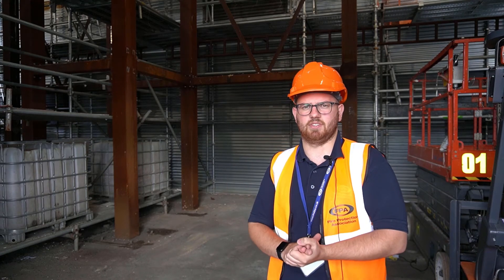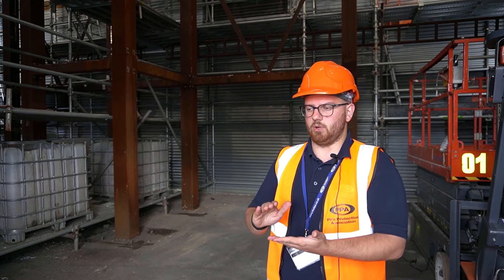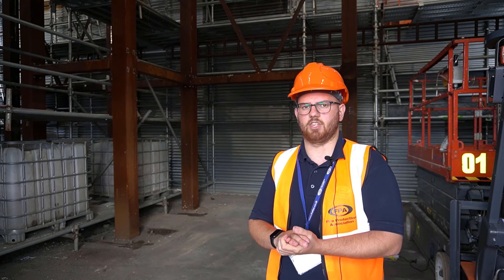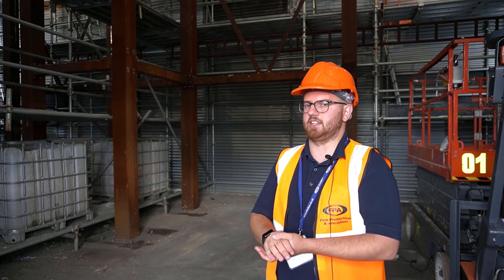Every project starts with the initial inquiry. After the inquiry, we essentially decide whether your system is appropriate for this test or if there is a different test more suited to your system. Generally for most high-rise cladding systems, BS8414 is the most appropriate test we have in this country. We will review the materials you are planning to test, and if we don't think the system is going to pass for any reason, you can save yourself money by not testing it and just getting it replaced — which has happened in the past.